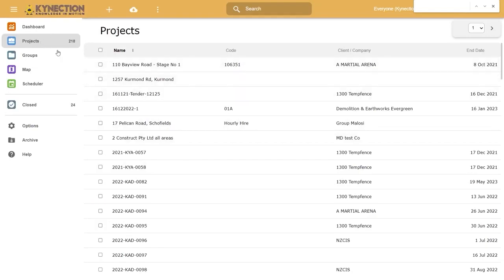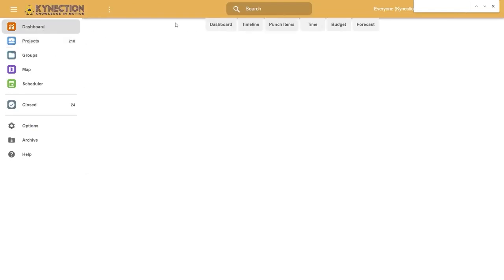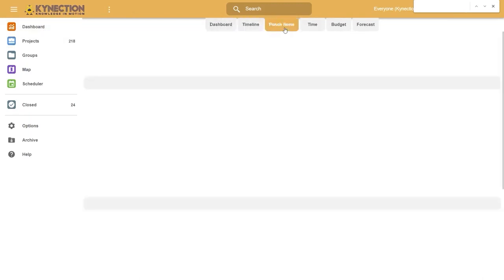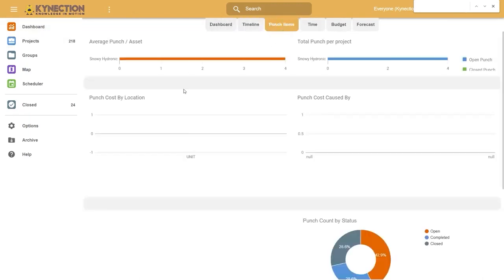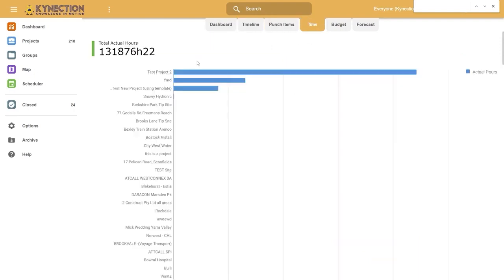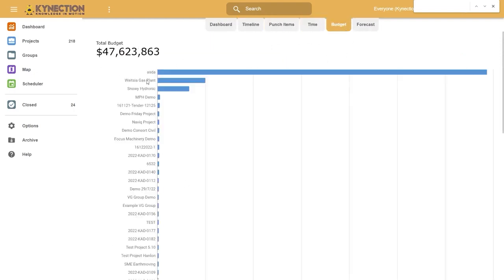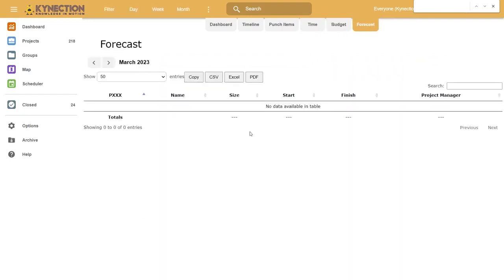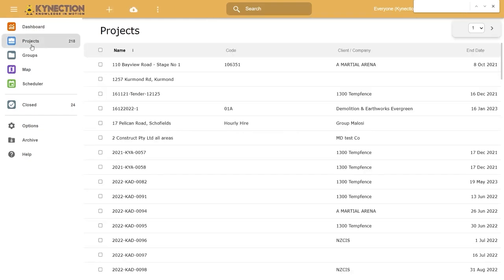Starting with the dashboard itself, which shows timelines across all projects in the system, any punch items logged against projects, overall time logged through labor, the budget across all projects, and any forecast data you might want to include. With this being our test database, it's relatively empty, so there's not much to show.